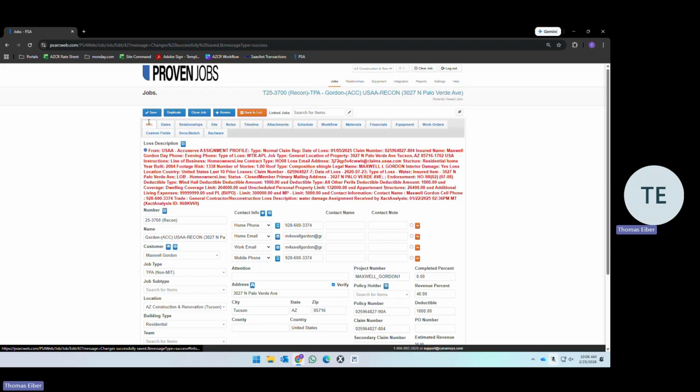External communication logs are also important, whether that's in the TPA portal, wherever that's at. Just making sure we're constantly communicating what updates we have and paying attention to the requests that they have for us. Lastly, key data: PCN issuance and status. When we are done with a project, you need to make sure that you are immediately issuing a PCN by entering the date in the dates tab for PCN. Once that date gets added, it pushes it to AR and AP.